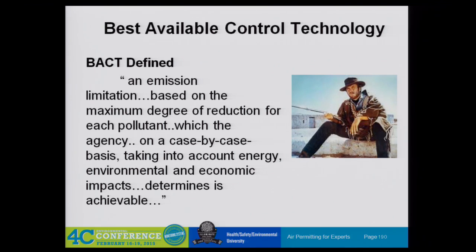And who knows, we might get lucky and say, even though we tripped it one way, if we put a little bit more controls on, we'll get back out of it again. So it's definitely good to do this before you launch full into the modeling and all the other analysis, to see if you were in the right place on your controls and your initial assumptions.